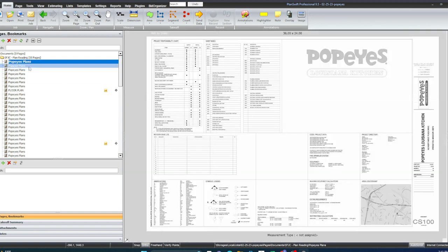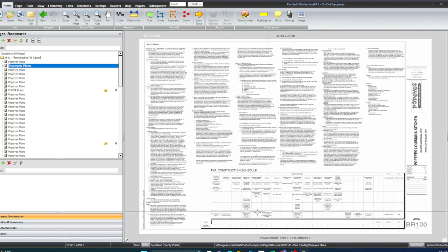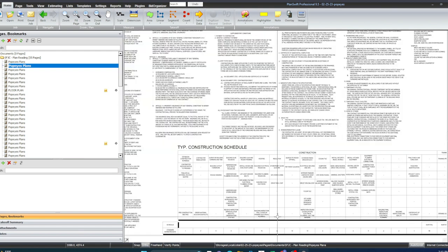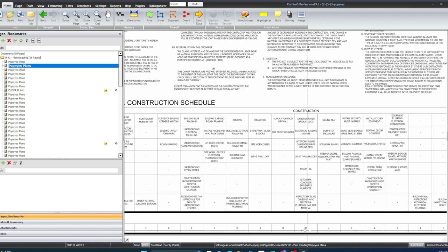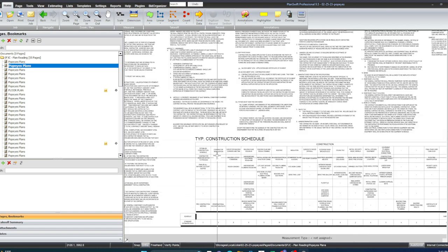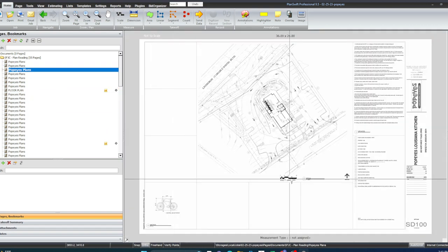The next sheet gives us a construction schedule. The construction schedule shows us what comes first and what comes second in the construction. I show my students how we base these days on the size of our estimate, and we go backwards, to help them produce a construction schedule.